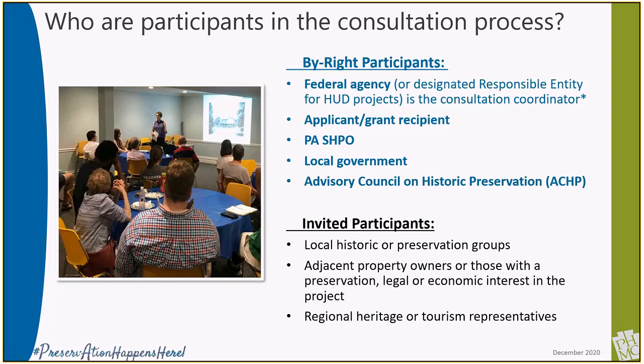In most circumstances, the ACHP does not choose to participate in consultation unless the project involves a landmark or is the subject of great public interest and controversy. But remember that notification of the ACHP is always required when the federal project has an adverse effect finding.